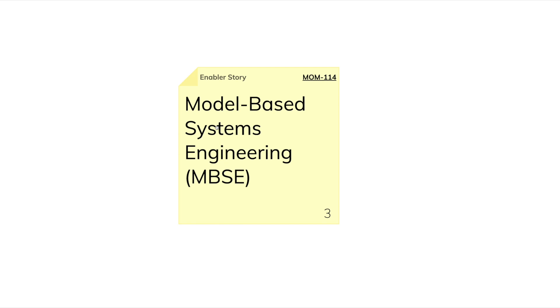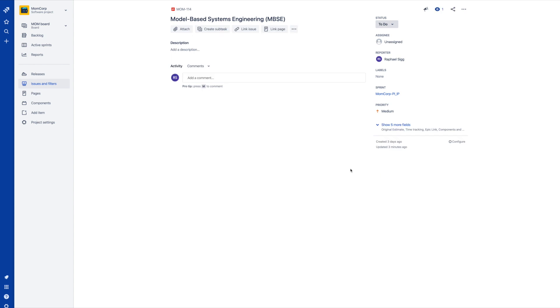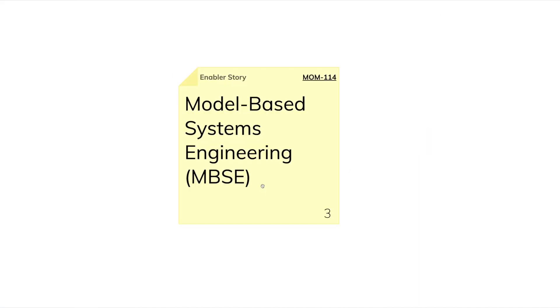If the sticky note is synchronized with an ALM tool, it also has an ALM key in the upper right corner. This one, for example, is synchronized with Jira. If we click on the issue key, it leads us directly to the issue in Jira. The same is true for rally-synchronized stickies.